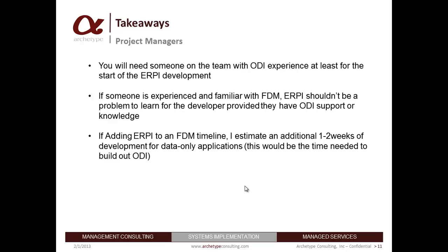Now, getting back to Ruth's question on timeline, let's say, for example, that you have a project like Inflow or Christie's where we have a planning project and then we add FDM. If you wanted to add ERPI to an FDM timeline to leverage both tools together, then I would say you probably need an extra week or two of development time to add the ERPI piece to the FDM timeline.